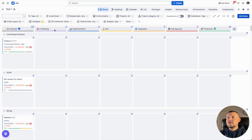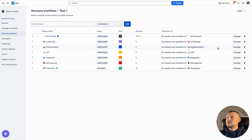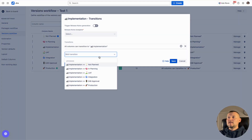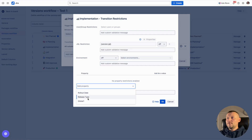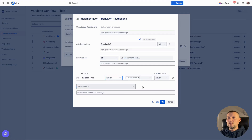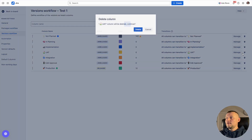As the next step, we can start customizing the workflow on our board. You can see the workflow provided out of the box. If needed, navigate to board settings and the version workflow tab. From this tab, we can see all the steps currently on the board, define transitions between steps, and customize what is allowed and what is not. For each step and transition, we can also define restrictions by user, JQL, environment, or by checking a property — for instance, that a step may only be available for major releases.